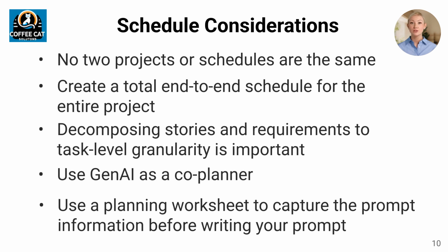Regardless of the type of schedule you are creating, decomposing stories and requirements to task-level granularity is important for quality of time and work effort estimates. Use GenAI as a co-planner, not as the final authority. The best results come from combining strong prompts, good source documents, iterative refinement, and project manager oversight to create schedules that are faster to build and stronger in quality.